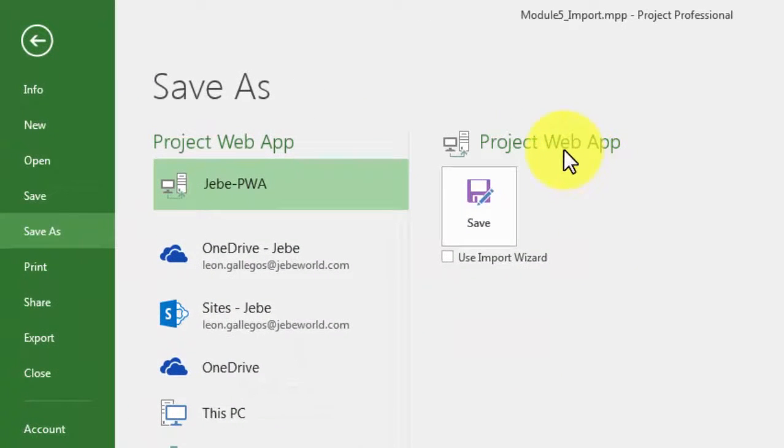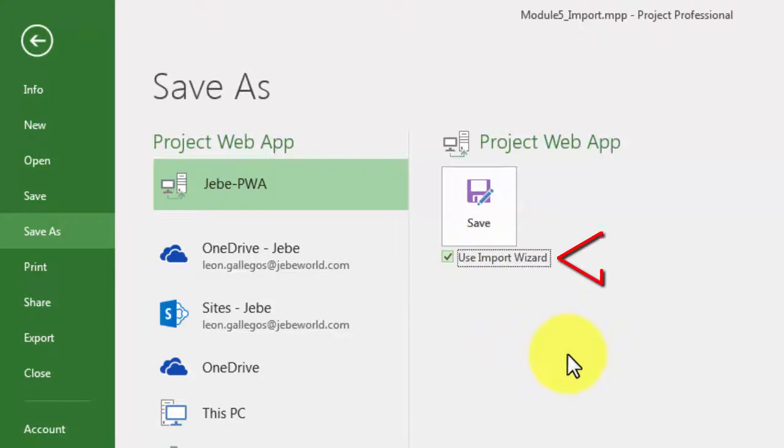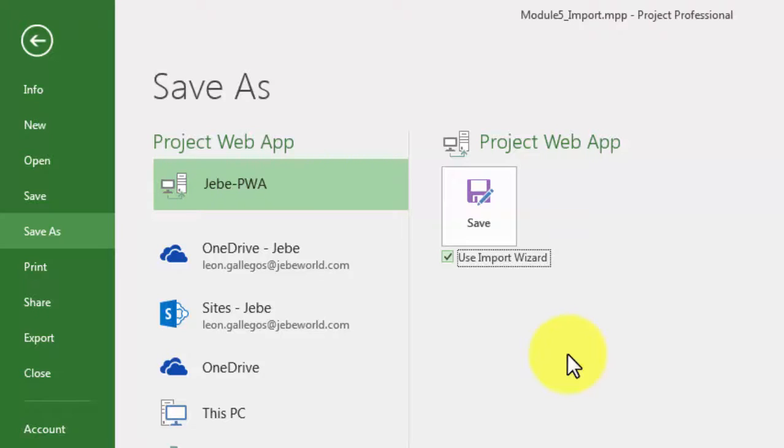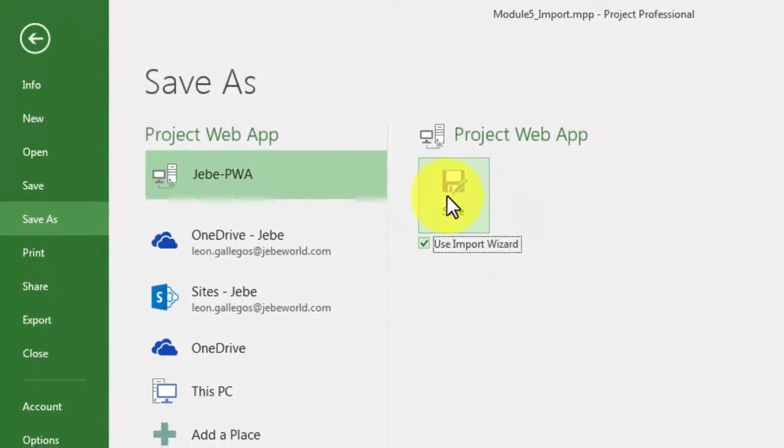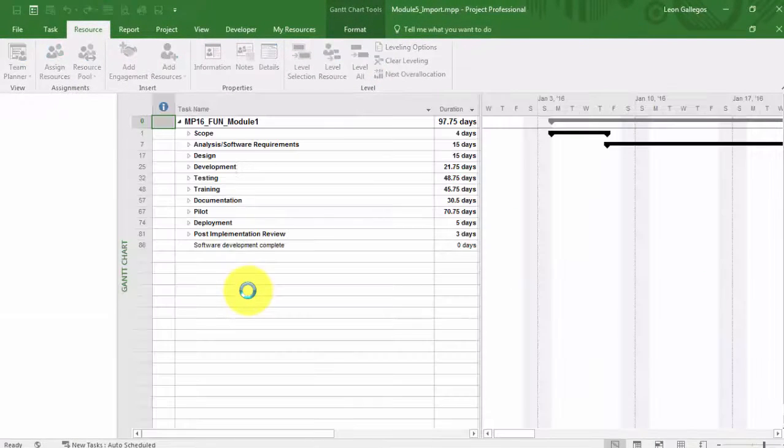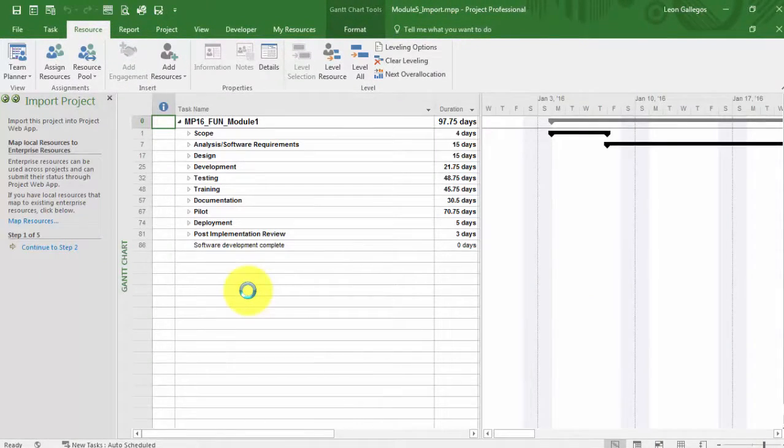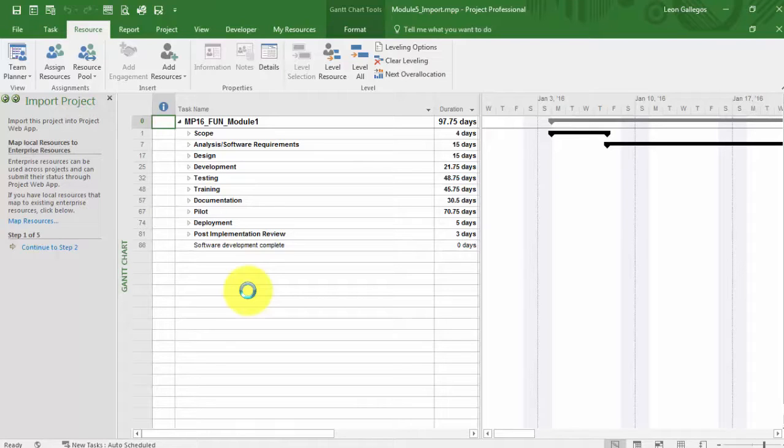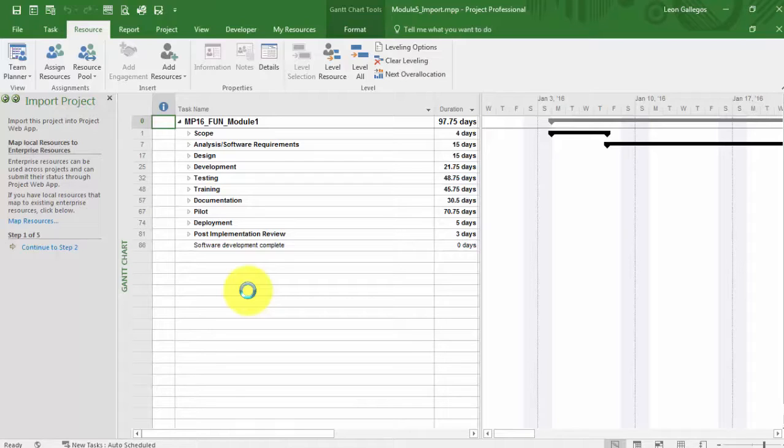From File and then Save As, it gives me the options of saving it to different locations, including of course the Project Web App. Now, I will almost always recommend that you use the Import Wizard when you're bringing projects in. I also recommend that the project managers that own the project also would be the user that is importing the project, as opposed to an administrator. I'll click on Save, and by checking the wizard, we're basically telling Project that we want to walk through step by step the importing of this project.